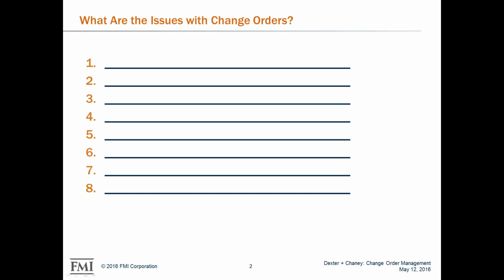Okay. Another one here is incomplete information or scope not defined. Delay in receiving written approval for a change order, usually given to us after monthly billing is submitted. Here's another one, ignorant, unfair owners and consultants. Verbal approval of change order given, then at the end of the job, owner refuses to honor that. A&E not agreeing with the cost, so there is an extended negotiation or approval process period. That's what we have so far.